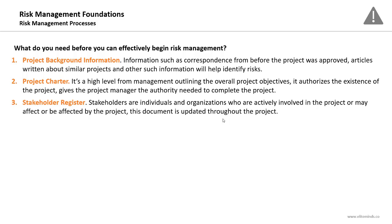The stakeholder register — stakeholders are individuals and organizations who are actively involved in the project or may affect or be affected by the project. The stakeholder register is a live document that will be updated throughout the project whenever a stakeholder is identified or a stakeholder's risk attitude changes.